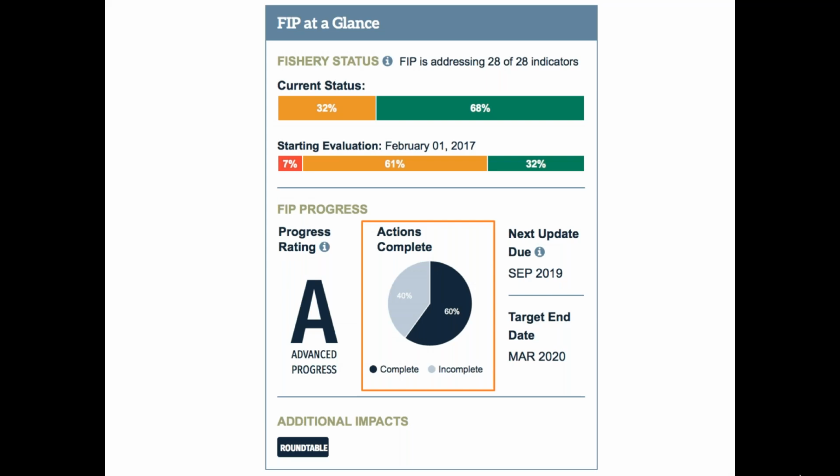Yes, you did. I just want to also add that having gone through so many work plans myself, it's clear that there is a balance in the number of actions that is practical, probably both on the ground as well as for reporting on FisheryProgress. So if there are too few actions and there's a number of tasks associated with each, it can be difficult to demonstrate progress through the completion of actions, as Jesse just pointed out.